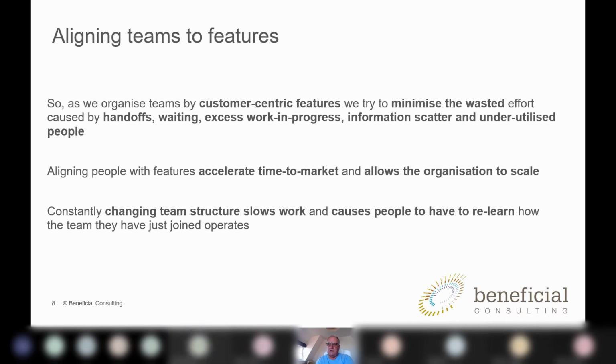What I use is evidence-based management. I collect some data to say, look, our smaller pieces of work go through the pipeline faster, so therefore if we break it down smaller, we'll get through faster. Using the flow argument, basically.